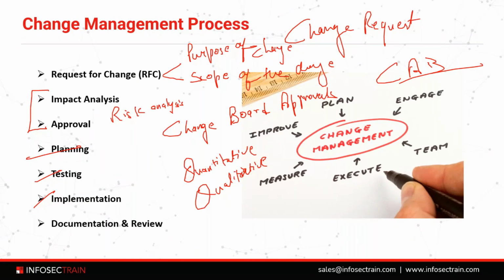That means in a computing environment designed to replicate the production environment, but isolated from it. The change implementation in the production system should be scheduled at an appropriate date and time to minimize the risk of system downtime or other negative impact on the workflow of business units that depend on the IT system being modified. Most organizations have a scheduled maintenance window period for authorized downtime. Stakeholders should be notified in advance if there is risk of downtime. Every change should be accompanied by a rollback plan so that the change can be reversed if it has harmful or unforeseen consequences.